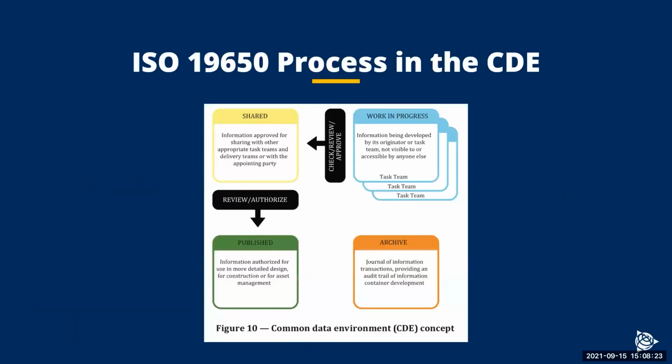Next slide, please. These days, we're more and more being asked to conform to the standards which are necessary to collaborate in the digital world. In particular, at the moment, we've got this wonderful new international standard, which developed from what was BS 1192, ISO 19650. The idea is that work in progress is shared with others, and for that you need a common data environment, is then published, so that is a given deliverable, and then is recorded. That's that golden thread of information. And that's the service that Viewpoint for Projects offers.